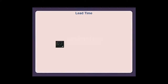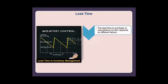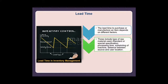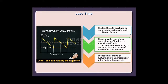Lead time: The lead time to purchase or manufacture an item depends on different factors. These include the type of raw material used, standard or special specification, processing time, machine scheduling, and distance between source and user location. The lead time may also fluctuate due to unpredictability in these factors themselves.